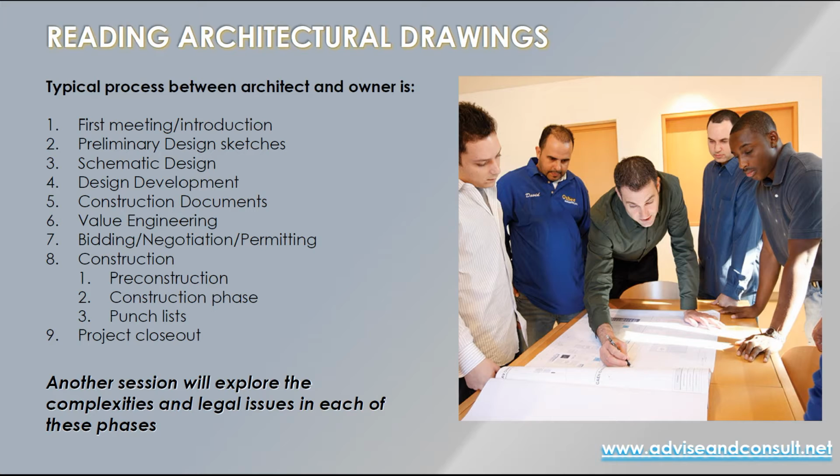Design development is where typically all of the different subcontracts of the architect, the mechanical systems, air conditioning, heating, HVAC we call it, electrical, plumbing, landscape, civil engineering, are coordinated, so that when you pass from design development into construction documents, all of the disciplines know what the project is and have agreed on how things work. I will talk about that in further detail as well.